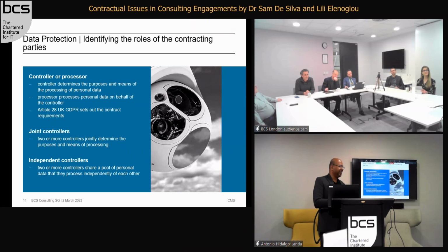Up until about 2 years ago, one wasn't too worried about inflation, but all of that's changed. Another idea for protection is, for goodness sake, give ourselves a price escalation clause. I think that would be important if you agreed a fixed fee. If you didn't agree a fixed fee, and you're doing it on a time and materials basis, then you should have a clause saying you can adjust the pricing, without linking it to inflation or not.